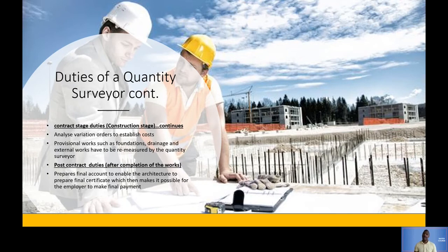After everything has been done, he sits down and consolidates all his information, as in how much material was used and how much it cost in total value. And then he balances that up with the final payment certificate that's due to the contractor.